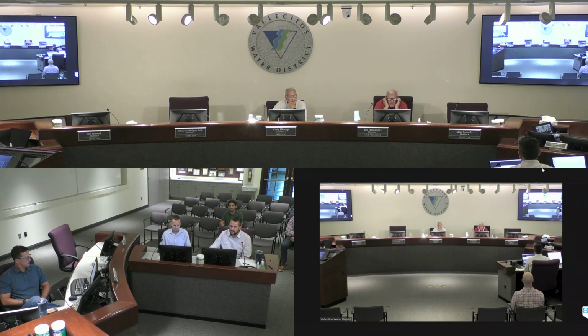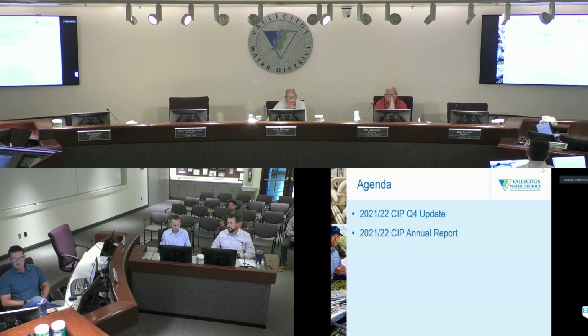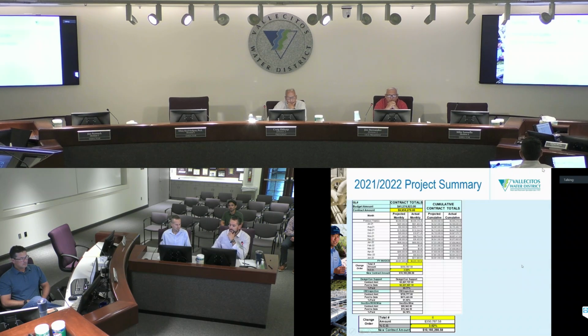I'm just going to get back to the presentation. Okay, getting right into the CIP annual report, what we did all year last year. So in summary, construction contract work, we totaled just under $10 million. That's a big number, and it's a little bit misleading of a number because a large chunk of the San Marcos Interceptor Phase 2 project got carried over into this fiscal year because it wasn't completely paid out in full. We did a retention payment. I believe we did one additional contractor pay application, which wasn't retention, so some of that money got carried over into the fiscal year, even though there wasn't a whole lot of actual construction work being done, really none, on the San Marcos Interceptor Phase 2.